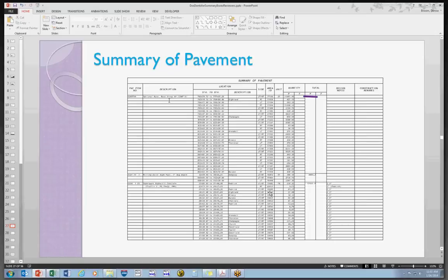You couldn't take that picture we had before. It didn't have dimensions on it. It was a pretty picture of where an area was in the comp book. You've got a plan sheet. You have whether it was on the left or the right side of the road, and you have the station range. So you know about where it's at, and you can guesstimate. If they've got these area IDs in here, that means they've gone in with MicroStation, they've created that shape, and they've had it calculated.